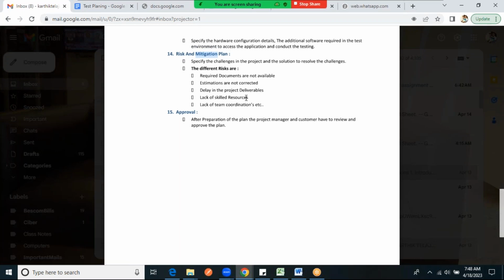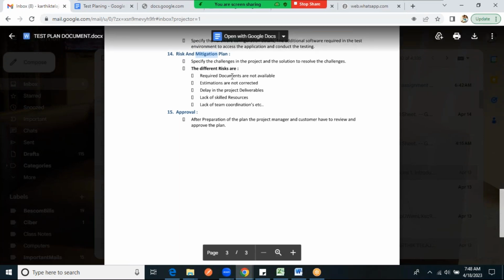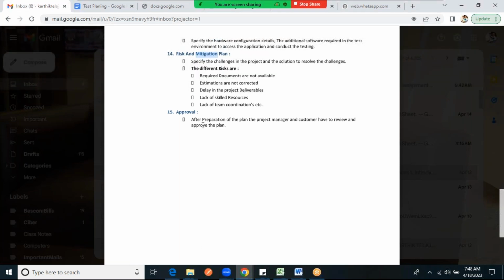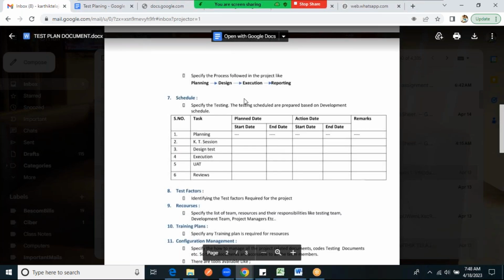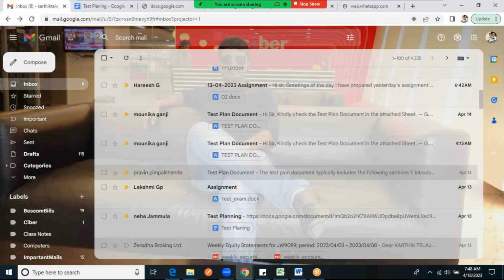From some other project you may take some people, shadow resources for the time being, or sometimes BAs will pitch in the testing. So you need some plans for how you are going to avoid or reduce that risk; in the mitigation plan you need to mention it. Understood?